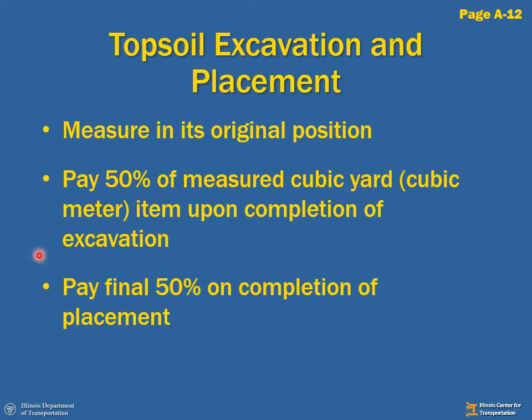Then they're going to stockpile this material, and at some point we're going to ask them to respread or place it on the job site, either in the same spot or somewhere else. Once they've completed the placement portion, we will pay the final 50%. Let's look at an IDR.